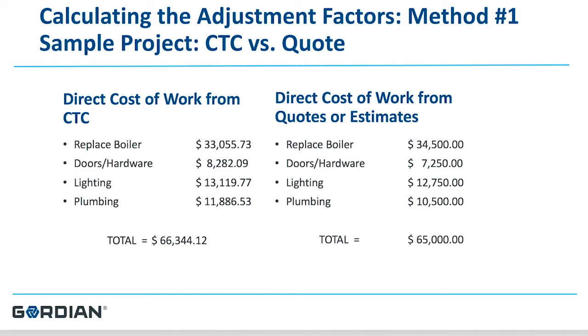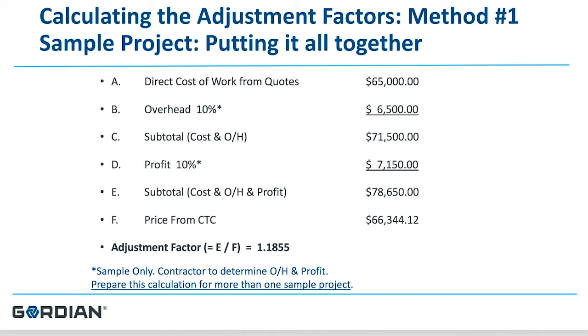Now take into account your overhead and profit. Take direct costs of $65,000; add overhead of $6,500 (10%) and profit of another 10% — your subtotal is $78,650. The price book, however, is offering you $66,344.12. To establish your coefficient, divide your subtotal of $78,650 by the CTC price of $66,344.12, giving you an adjustment factor of 1.1855. Do that on two, three, or four projects — this will give you a value for the book and tell you what that adjustment factor needs to be.